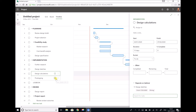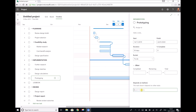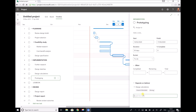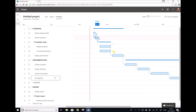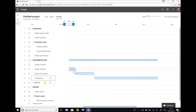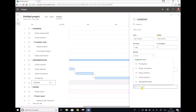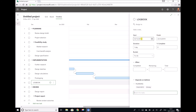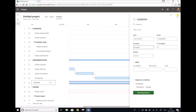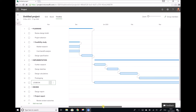Finally in this section we have prototyping. We said that prototyping had a long lead time of 10 weeks, so 50 days, and it can't be started until our calculations have been completed — task 11. And there we have all of the details for implementation. Next we have our logbook, which we want to run alongside implementation. If it's running alongside implementation it can't start until planning has been completed, and its duration is going to be the same as all of implementation, which was 85 days. We can now see that our logbook runs alongside all of those implementation tasks.